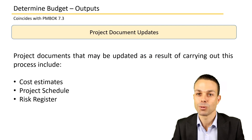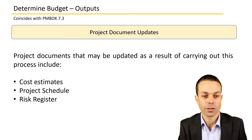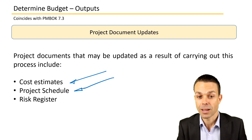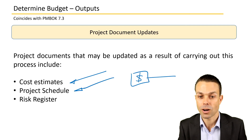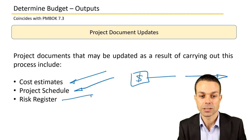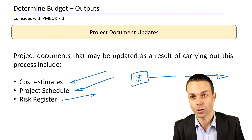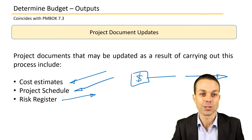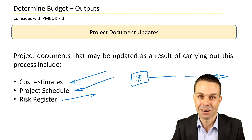Project document updates are also outputs. Cost estimates will need to be updated. The project schedule may need to be updated — for example, if resources can't be obtained at a certain point in time, the schedule may need to be extended. Any risks associated with cost also need to be updated. And those are all the details for determining the budget within the Project Management Body of Knowledge.